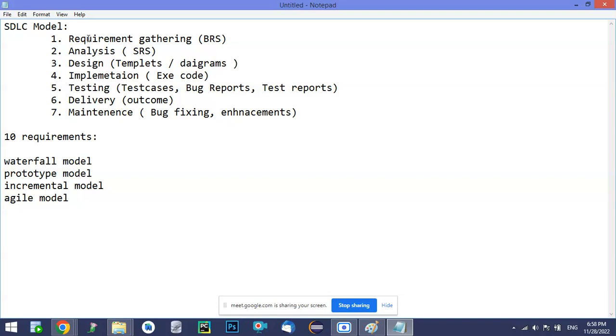For example, say two persons are there, and one person quits the project. What is the next approach for that? Or else you selected Python as a technology. Assume that today it's a free version, and tomorrow it becomes a paid version. Now what is the approach? Can we go with that? Will you bear the cost, or will you migrate to a free version?